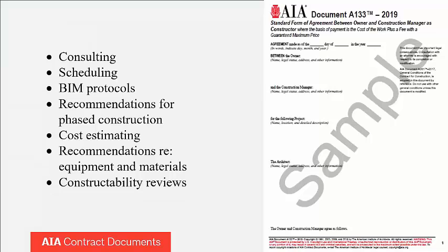I'm now going to move into some specifics about design assist services and what they entail. I mentioned before that I've been working with AIA contracts on a day-to-day basis for quite a few years now. So I'm just going to shamelessly tie design assist and delegated design back to our contracts. And from our perspective, the most common design assist services are those that are found in the pre-construction phase of projects done in a construction manager at-risk delivery method. You're going to find the same services that I'll be talking about in construction manager at-risk. You'll also find them in CM as advisor projects as well.